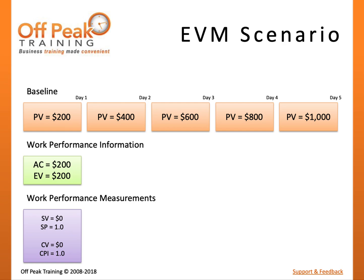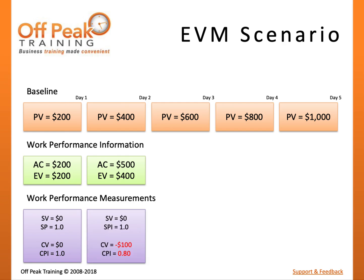On Day 2, you complete Task B at a cost of $300. Since we earned $400 and planned $400, our Schedule Variance is zero. However, we have earned $400 of work but spent $500, so our Cost Variance is negative $100 — we are over budget. Our Cost Performance Index tells us that for every $1 spent, only $0.80 worth of work has been accomplished.